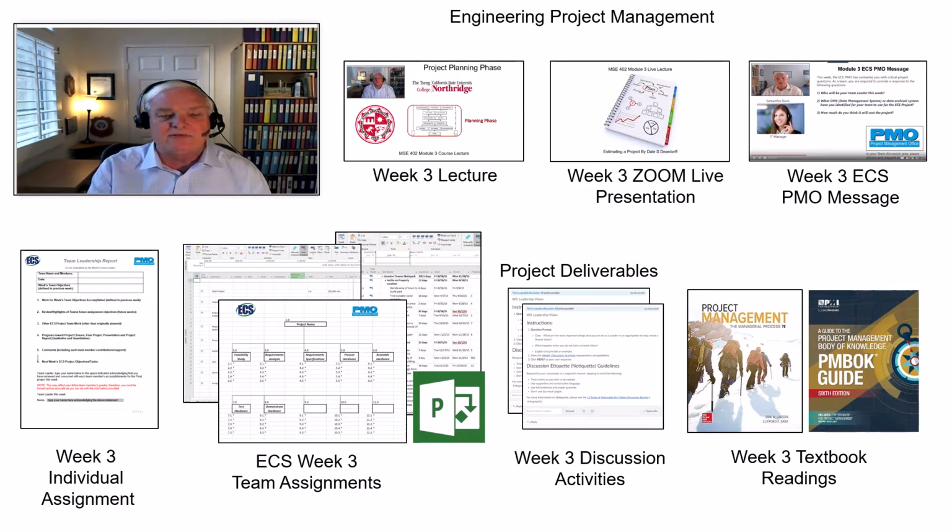What are the tasks necessary? So what is the milestone? What is the goal? And then what are the sub-goals? What are the different things that need to be completed so that you can end this task and lay those out in a hierarchical type of structure? We've given this for you. You can print it out and you can go ahead and manually enter these if you want. You're going to find that that's a very valuable way to do it. Then once that's done, and that is a deliverable that the project leader will have to deliver, is the completed Excel spreadsheet with everything in it.